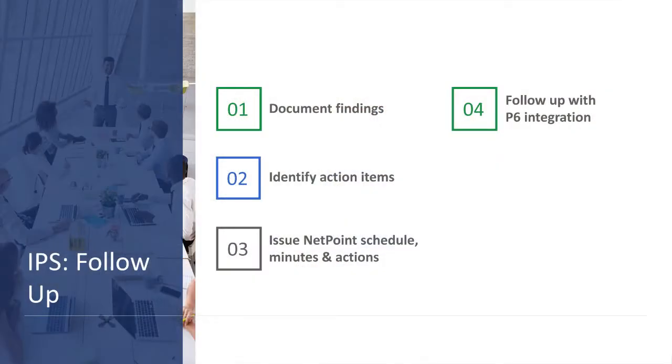Okay, follow-up. So you've had a great meeting. People are agreeing with the terms, the dates, the processes, the interdependencies. You now want to document that and close the loop. Typically, our audience loves working with the Netpoint file, and we just pitch that right back out to them in an 11 by 17 or 8.5 by 11. Also, get back out those action items. Make sure everything is right, but then kick it out as quick as you can.